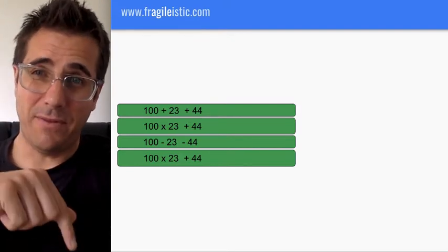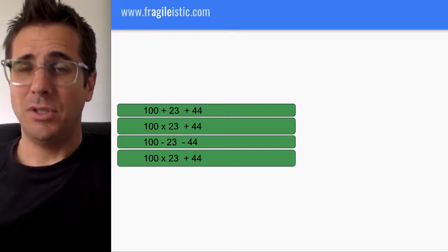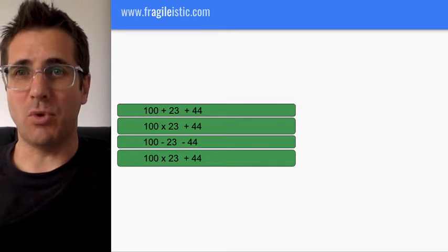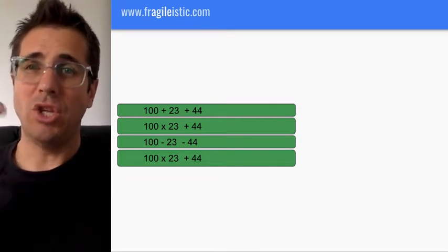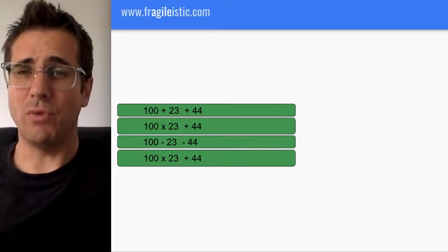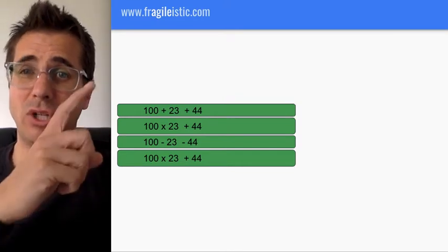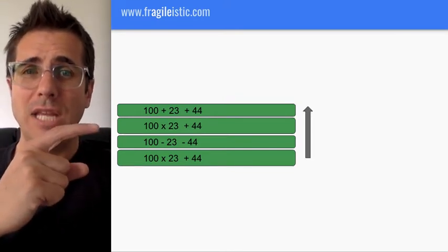The good thing about the Fibonacci system, you can add it up. So you don't end up having to say we can do 2 medium, 1 small, or 4 small, 1 medium. You're just not doing that. You're saying we can do this sum of story points. Anyway, the important thing is, I'll do a video on estimation. In your planning, you need to do the following things.